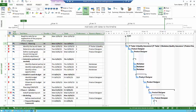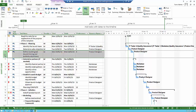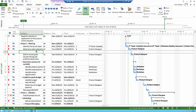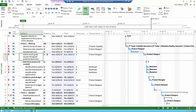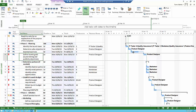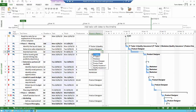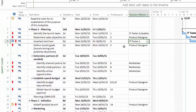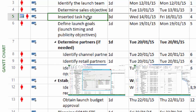When the template comes, it's your starter for 10 — it comes with the type of tasks you would use for the project type you've selected. So for a software project, you'd have the different tasks you'd use for that. You can come in and insert tasks: select the task you want to insert above, then click the Insert key on your keyboard. You can put in a duration for the new task, which appears on the Gantt chart. You can also assign a generic resource to that task, which we'll cover later.